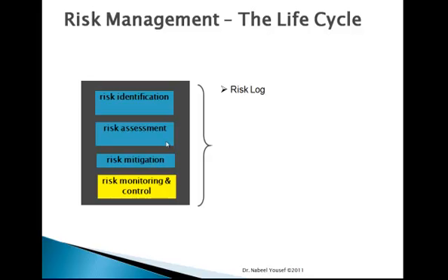When we implemented it, did we have any other risks related, or a new risk that came as a result of mitigating the first risk? All this goes in a log, and we will know exactly if it was addressed, solved, what the loss was, and whether we reduced or eliminated the loss, and so on.